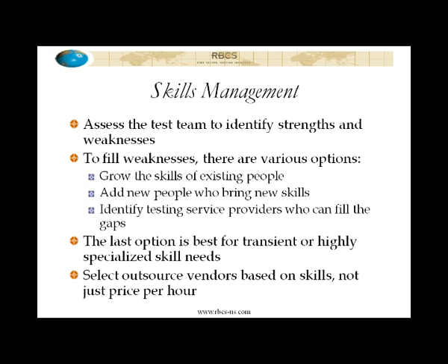Specialized team, what you would have is clusters of threes, right? People who are specialized would be experts in particular areas, but in the other areas they might just have ones or twos or maybe even zeros. Okay, so you can set up a spreadsheet for this fairly simply and do it that way, and I think that's the best way to do it. I wish I could claim to have originated that, but that's just a fairly straightforward human resources technique, skills inventory, but it is quite effective.